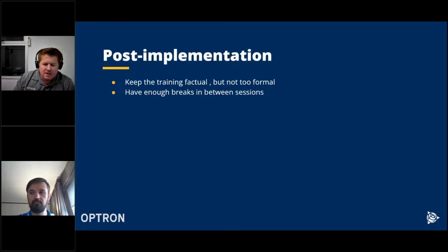I've also found that sometimes it's easier to schedule, for instance, a 2-day training session for a new customer. And then in the quote, we've also built in to go back, let's say, after 3 months to do another, let's say, 3 days. Because if you show them everything in the beginning, it's very overwhelming, and you might as well almost show them nothing.